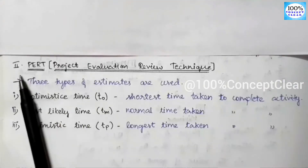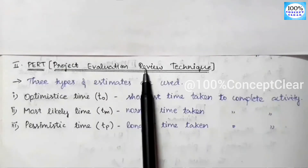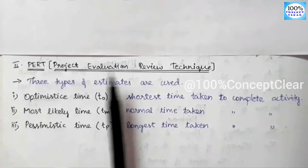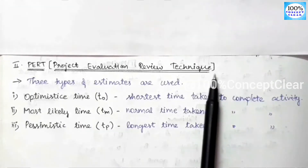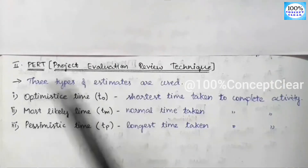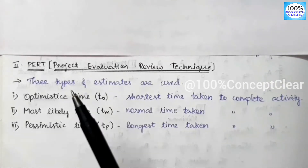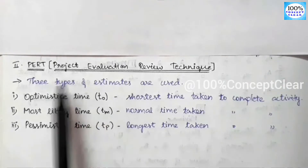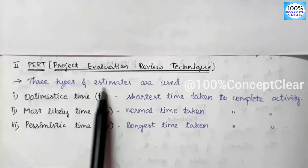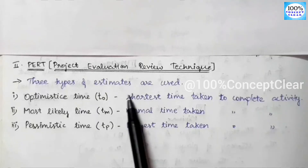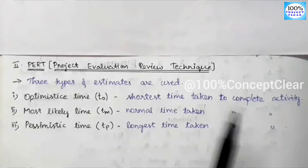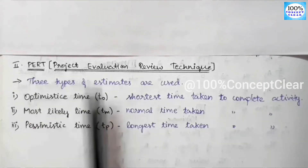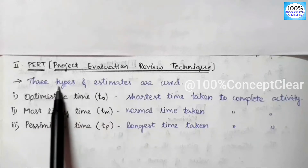Next, we will see the PERT method — Project Evaluation Review Technique. The major difference between CPM and PERT is that in CPM, a single fixed duration is used, while in PERT, we find three types of time estimates. All other methods — Early Start, Early Finish, Late Start, Late Finish — remain the same.